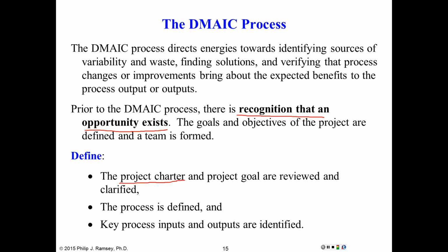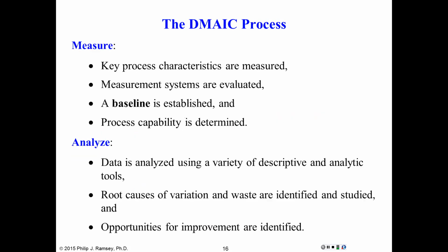So basically, in the define phase, we define the project. This will be represented by a project charter. We define the process that we're studying, and we start identifying key inputs and outputs. And as I'll explain later, if data exists, we may begin exploring data for potential cause and effect relationships.